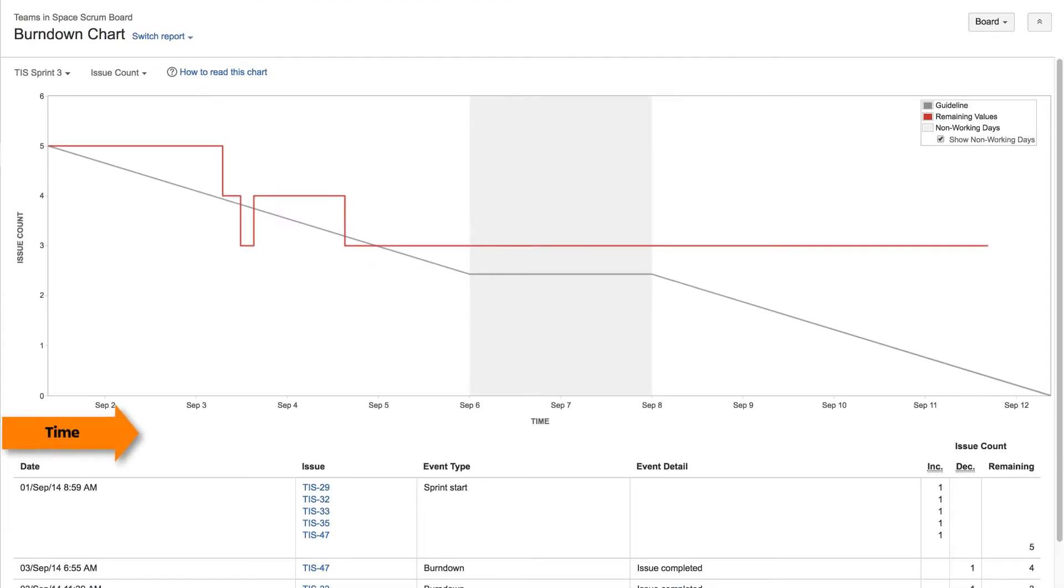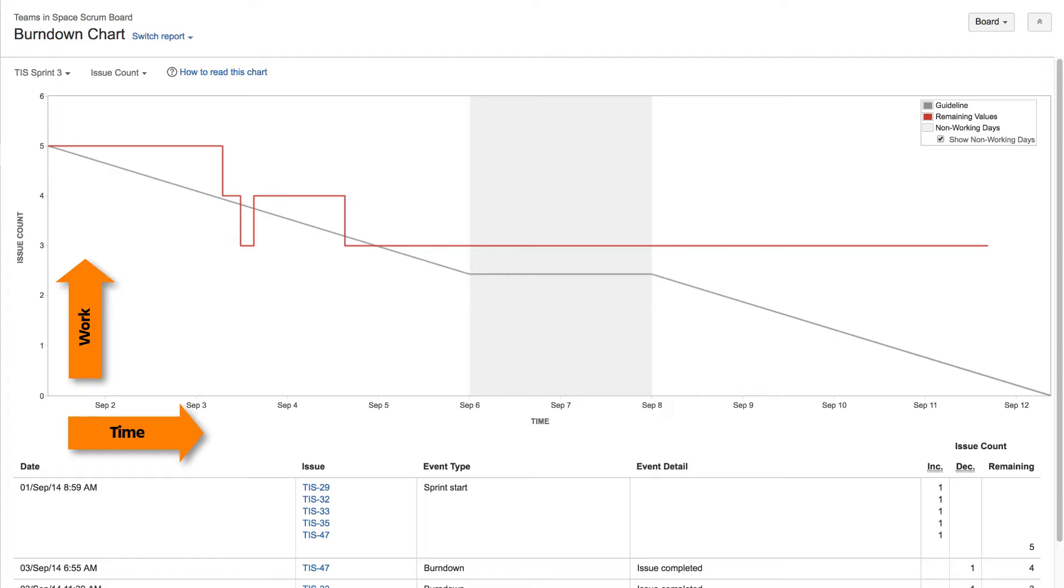The horizontal axis represents time, and the vertical axis represents the number of issues or story points, depending on the estimation statistic you've chosen for your board.